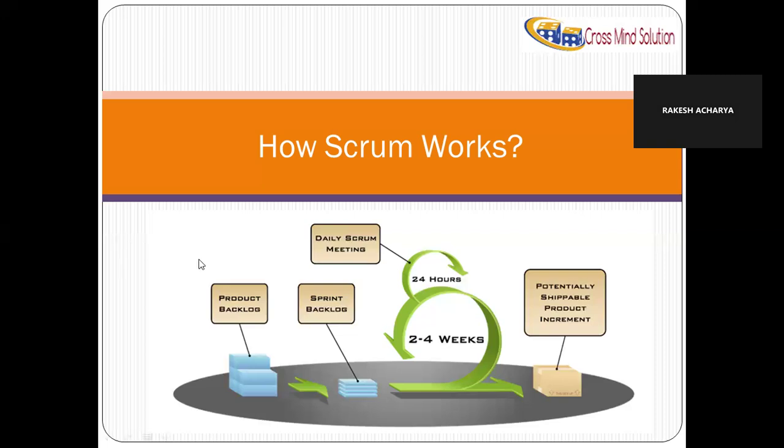If I'm going to work with waterfall, I know that everything is ready, end-to-end, and I know what I have to deliver. Agile is saying, when you are not sure what features you want to develop, then go with the Agile concept. If you know all the features that you want to implement, choose waterfall. But as Agile is nowadays the more chosen technology, the option preferred by the market, people want to develop in Agile. So even though you know everything,